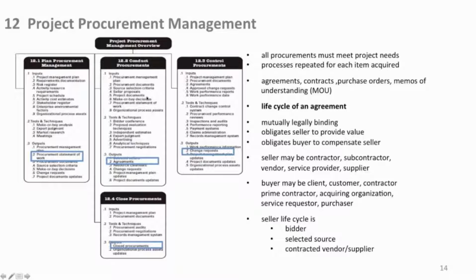So statement of work, you go through this multi-use activity process here, conduct, because many things go on. First, you pare out suppliers that are not capable, and you come up with a selected supplier list. You go out and you get bids. You have your bid meetings, and then finally you actually place an agreement or a purchase order. That's the agreement. And then nothing stays the same. Basically, it's very rare that you place an order and it just comes in as you ordered it. There are change requests.